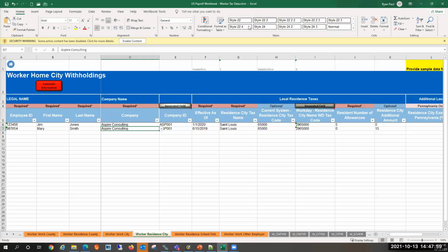So in the end, what you want to produce out of your script is something that you can come over here and paste right into this template. A lot of the templates you'll get from your implementation partners will have buttons that you can click if you were doing these manually. If a particular file only had 6 records, it's probably not worth spending a week building a script and testing it for 6 records. You might just come over here and hand type those 6 records into a template.